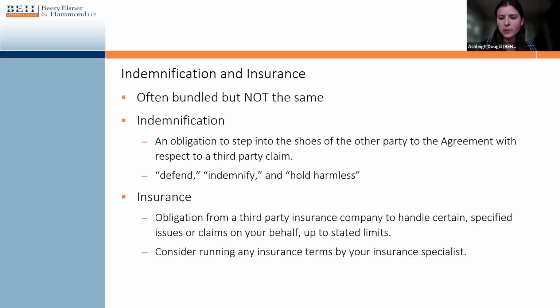Setting aside other legal arguments and remedies, and only looking at the categories here, the contractor would take two steps. First, if there was good indemnification language in the contract for us, for the public entity, the vendor would be required to step into the city's shoes for this lawsuit, defend the lawsuit on the city's behalf, regardless of the outcome, including all attorney's fees, and be responsible for all legal risk and the outcome associated with the lawsuit.